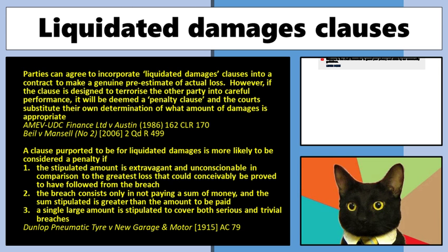And there's a couple of specific situations which I'm going to talk about here. Specific types of contractual damages. This is a rule that can come up. It can come up for you guys, and if you're involved in contractual negotiations, you'll need to know what the term means. Basically, when you're negotiating a contract, we can say, oh, look, if you breach by not accepting my ice creams, you're going to have to pay me $1,000, for example. We can put whatever number we like in the contract. It's a contract. All right? If I rock up, I reserve the right to take the ice creams away and sue you for $1,000 for restocker's fee or whatever.